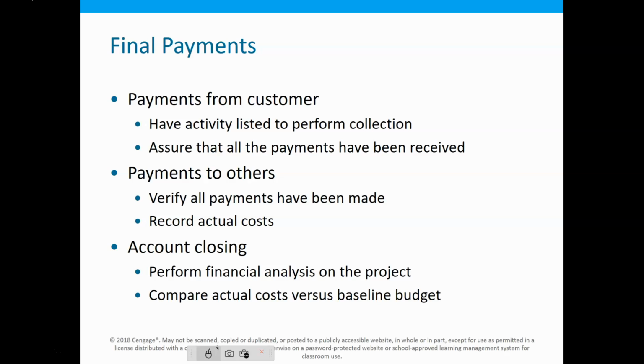So that happens in our project. We need to make sure that all payments are made to others, because those subcontractors, suppliers, vendors, whoever else is involved in this project, all get paid. And that allows us then to figure out what our actual cost on a project is.